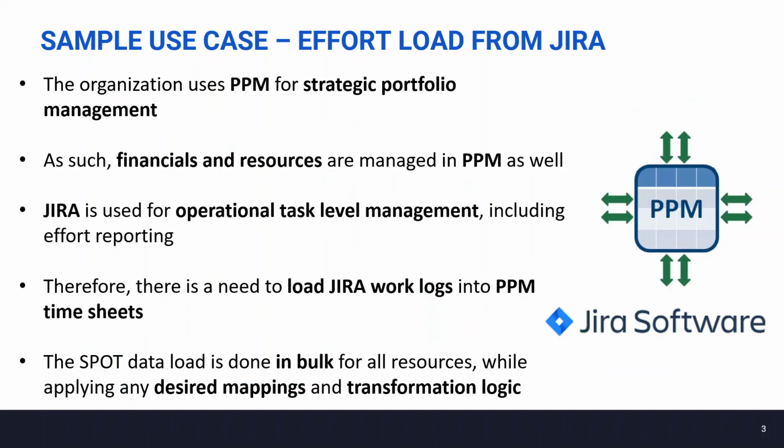Now let's set up some background and context for our effort load from JIRA use case. We're going to assume that our organization in this demo uses PPM for strategic portfolio management. Because of this, financials and resources are managed in PPM as well. Alongside PPM, they also have JIRA, which gets used for operational task level management, including effort reporting. Because of this, there is a requirement to load JIRA work log information into PPM timesheets to get important financial and resource information reported on. The Spot data load gets done in bulk for all resources, while at the same time, it can apply any desired mappings and transformation logic.